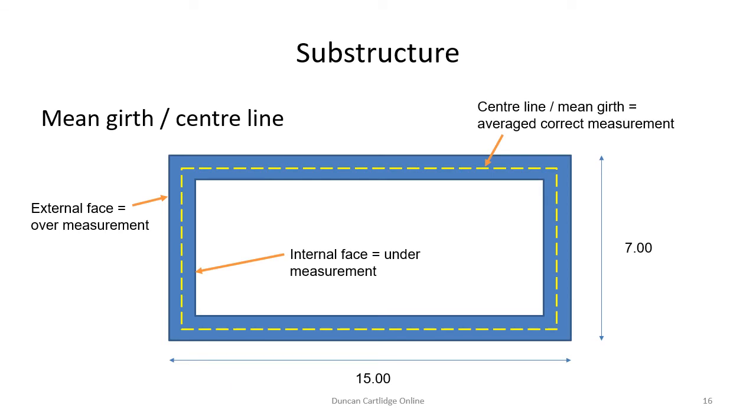This slide shows the logic behind the use of mean girths or centre lines. Calculate the length using the external face and you over-measure. Again, if you calculate the length using the inside face, you under-measure. Therefore, use the average of the two or centre line girth, shown here in yellow.